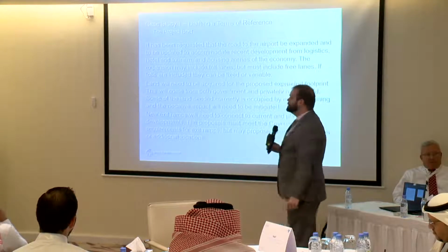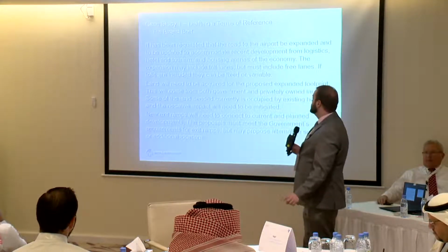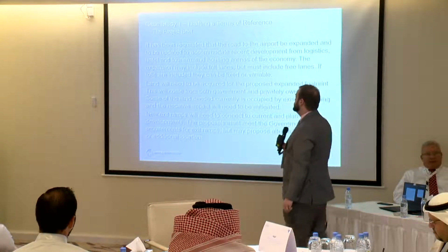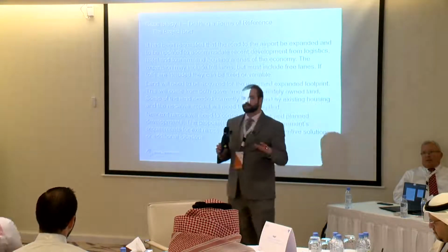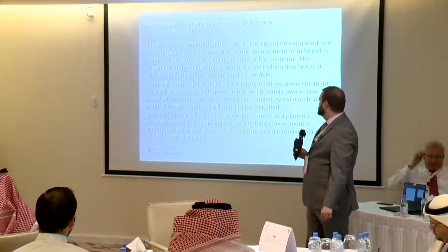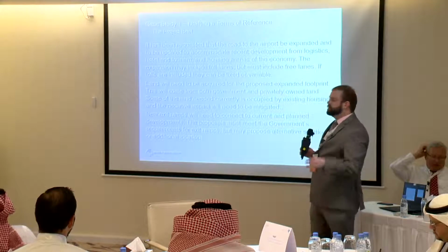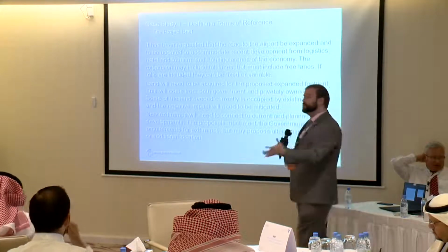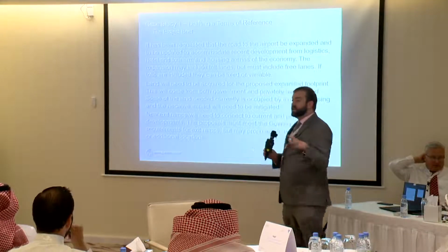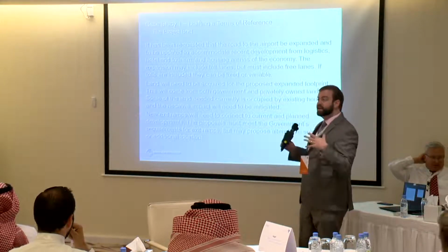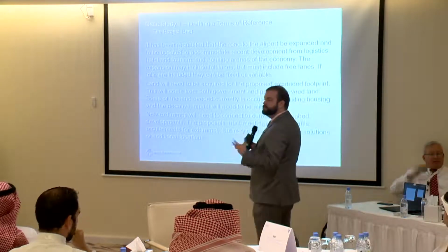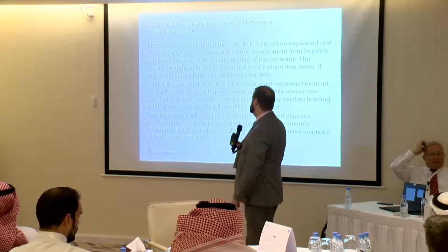The expansion may include toll lanes, but it must also include free lanes. If the tolls are included, they can be fixed or variable pricing. Land will need to be acquired for the proposed expanded footprint. This will come from both government and private land. Also, some of the land is currently occupied by housing, so you're going to have to address that in your TOR and how you would mitigate the negative impact.